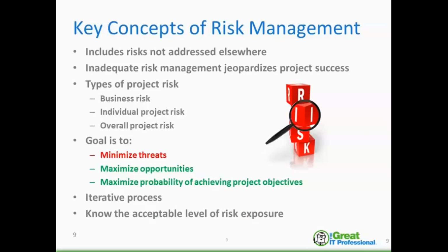You're going to have a well-defined work breakdown structure, and you're going to have meetings to define scope well. Maybe you do an is-not table, which is a favorite of mine, or maybe you do some other things, and you're going to document, and you're going to get sign-off on the scope that is defined. And you're going to put a good change control process into place and make sure everyone understands it. But even after doing all that, there's still the risk that you'll have scope creep, right? I mean, it's insidious. It is hard to detect, and it's always there. And it happens because of well-meaning team members, right? The people you have that always go above and beyond or always give